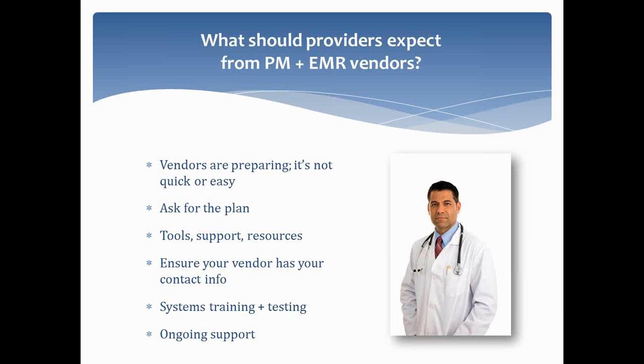So from that particular side, and if you imagine this for any of your external vendors that you might need to be working with, your lab companies, any device companies that connect into the PM and EMR, your vendors are preparing. Again, unless they're going out of business, they have an ICD-10 plan. They should be able to share that with you and talk about what they're doing and give you an expectation of timing and an expectation of what you're responsible for on the practice side for the go live. So ask for their plan, understand what tools, resources, and support your vendors will have available.